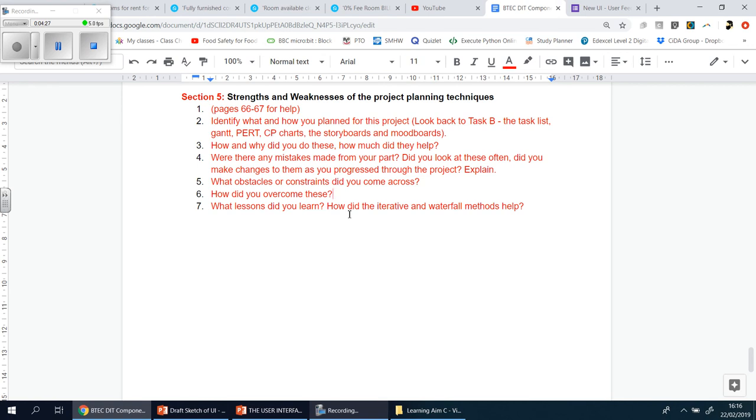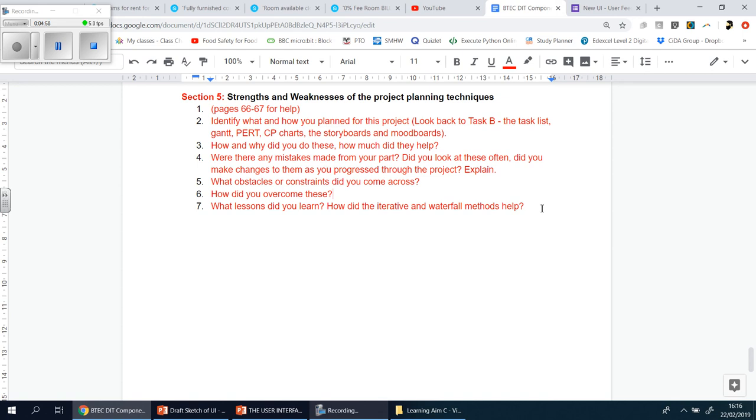And the last question, what lesson did you learn? And I don't want to hear anyone say nothing. Because you have to say you learned something. You have to say, this taught me something about the way I plan. Or I'm glad that I planned it beforehand, because it gave me an idea and a time schedule to work to. Or you can say, I learned that I planned three days for feedback. And in fact, actually, I needed two weeks because some people are working and so on and so forth. So I learned that actually I'll need more time than I first originally planned than I expected. Because when it comes to relying on people, people can be busy. But when it comes to tasks where I do by myself, work by myself independently, I can actually sit down and get it done. Because that's me relying on myself. So it could be small things like that.